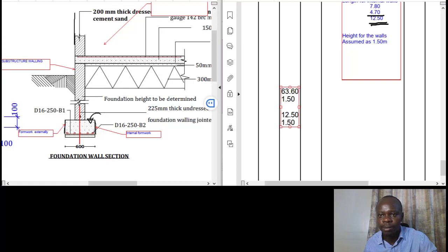We underline. You have to underline. That is signifying that you have two dimensions, which means that the final product is going to be in square meters. So just underline this one properly. The two, you underline that, and then you underline that as well.